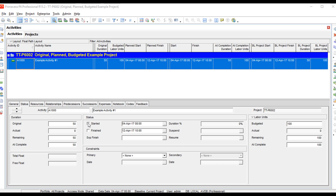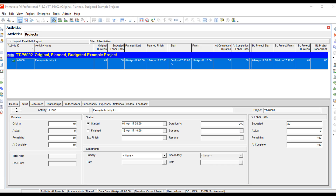Now watch what happens when I mark the activity as started. I mark it as started, then go back and change my original duration back to 40 — the remaining and at complete fields did not change. I also change my budgeted field back to 80, and the remaining and at complete labor units did not change either. P6 has disconnected those fields from the at complete fields. At the same time, it also disconnected the plan start and plan finish from the start and finish fields. When we mark the activity as started, P6 disconnects those fields, creating a baseline against that one activity.